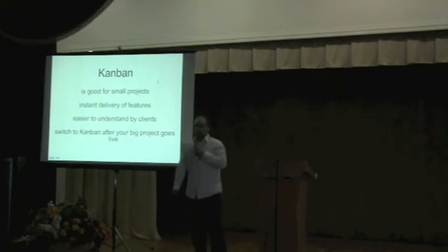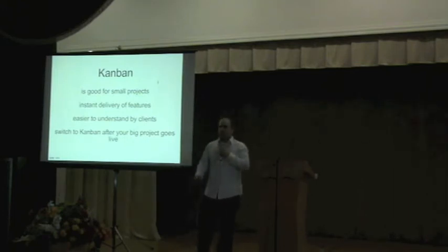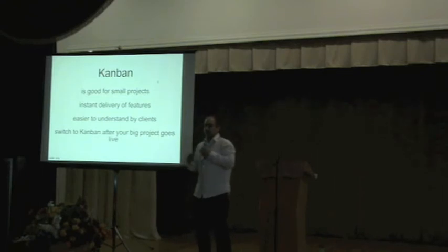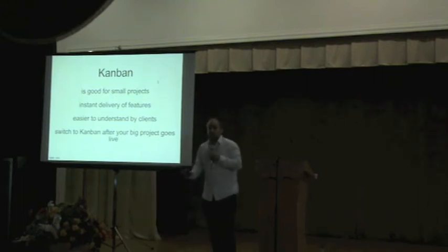We also switch to Kanban when a big project goes live. So when we have a project that we built for a few months and then we release it, there obviously will be some bugs, some things that you must fix immediately and stuff like that. Scrum is not very good for that because you have to wait 2 weeks for deployment. Kanban is perfect.